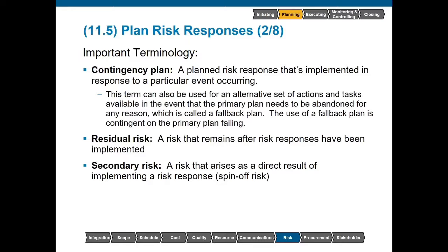This term can also be used for an alternative set of actions and tasks available in the event that the primary plan needs to be abandoned for any reason, which is called a fallback plan. The use of a fallback plan is contingent on the primary plan failing.